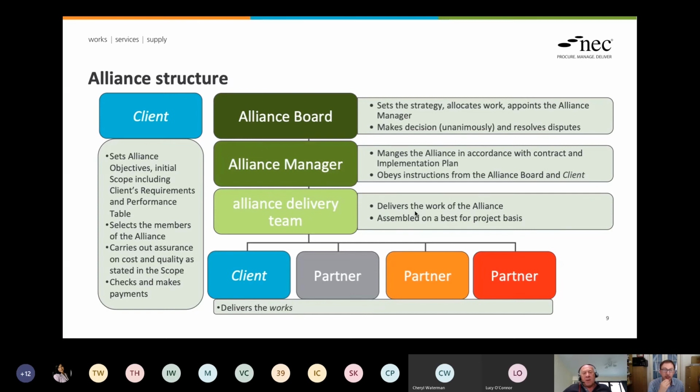Definitely. People quite loosely use the word alliance. I'm not convinced I've seen a true alliance in being, and I'm not absolutely sure that we're ready for alliance. We still have so many discussions on things like disallowed cost. People have a real hang up with things like disallowed cost and lack of productivity and inefficiency. If you've got hang ups on those sort of terms, then you've got problems, because none of those exist in the alliance contract. It is the greatest form of collaboration.